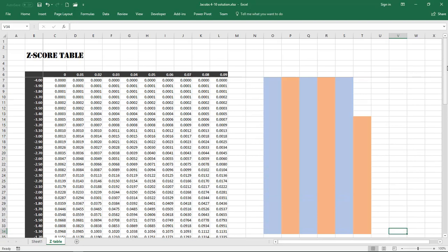So let's carry on. We're going to use this, this is where we have to get. Remember, to enter into this, we need to use z is equal to the point of interest minus the mean over the standard deviation. And we take that result and we come into this table and we do a lookup. The number we're looking up is along this left-hand margin here, and we might have to take into consideration the numbers at the top, which I'll explain later if we need them.